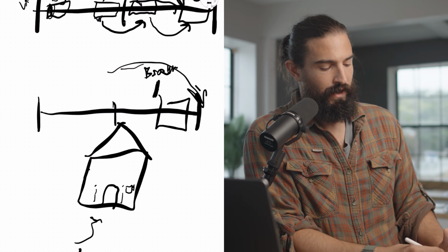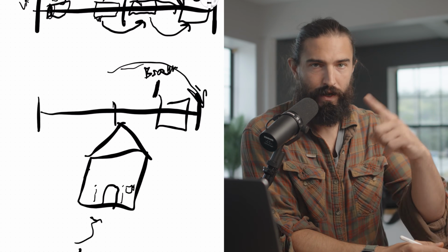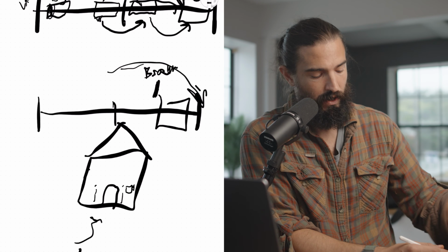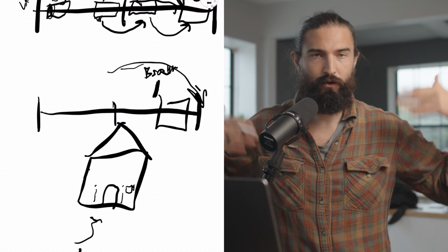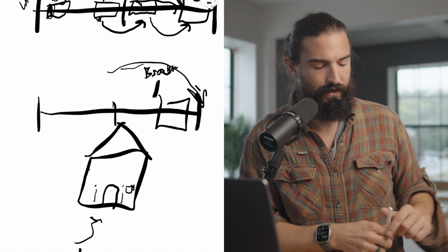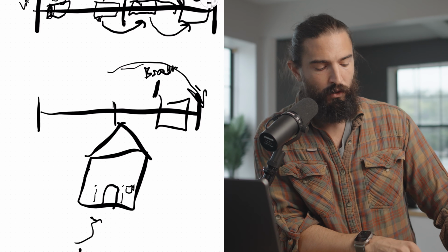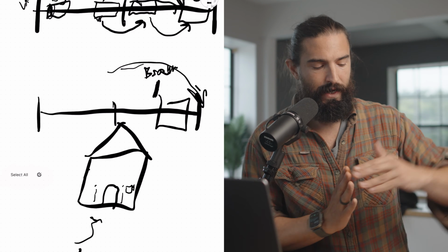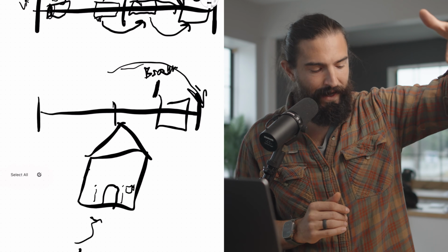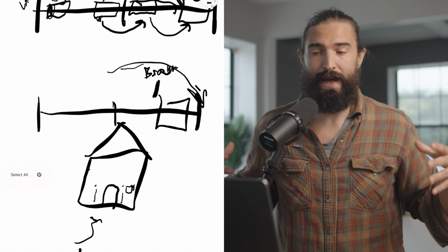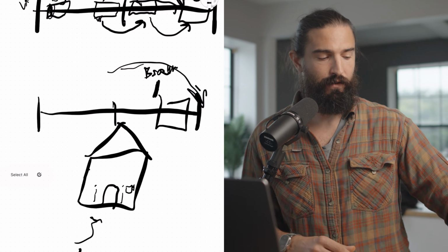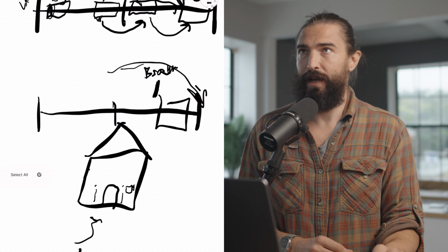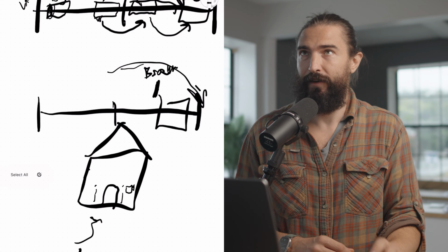Okay. And then I walk into the door and I see a couple more things. What are the first couple things that I see? I got to know how people are walking up to the house, and then I create the filter through which they see the rest of the house. So this is how I start thinking about writing up a scope of work. And then, once I actually get the property, I hone in the scope of work to be able to hand off to contractors.